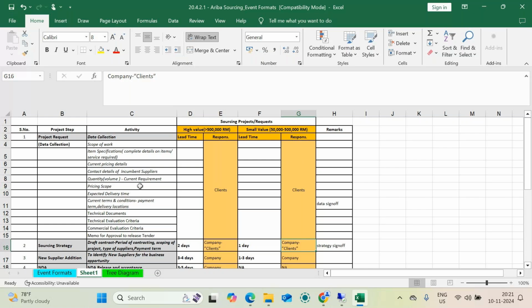So you are deciding the value. You tell the supplier, for all the years my spend is 10 lakh rupees for this particular material, and I want to do the negotiation with you for 1 year. You can just deliver me the material after every 3 months, every 3 months I require this material. You are even doing the rate negotiation, because you are doing the rate contract, delivery contract, material contract with them, so everything is in your favor.